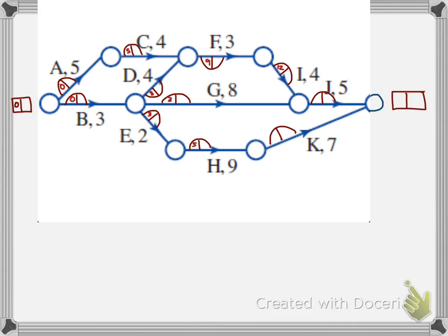Activity K, we can fill that in because the only one we're waiting for, sitting here waiting to start activity K, is H. H started at the 5-minute mark. It goes for 9 minutes, so we're going to put a 14 over here.